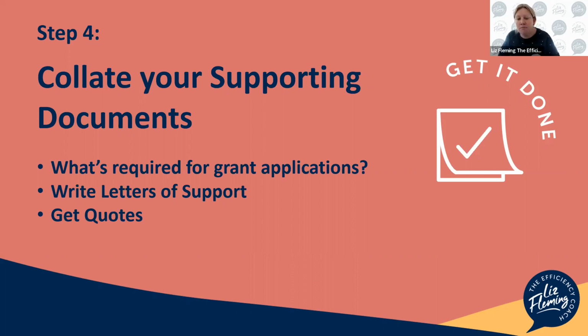Getting quotes. So most grant applications will not be able to be submitted without getting quotes. Doesn't mean you have to use those same suppliers, most often you don't necessarily have to. And the other thing with quotes is we get a quote today that's only valid for 30 days. We don't find out about the grant application for a few months. We might have to go and get it re-quoted as well.